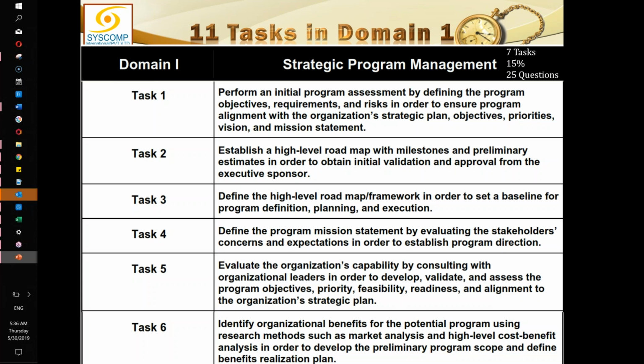Number 1 is establishment of a high level roadmap, and that roadmap is going to be about the milestones and preliminary estimates. So, high level roadmap with milestones and preliminary estimates. And why are you doing it? To obtain initial validation and approval from the executive sponsor. So you are also interacting with the executive sponsor.